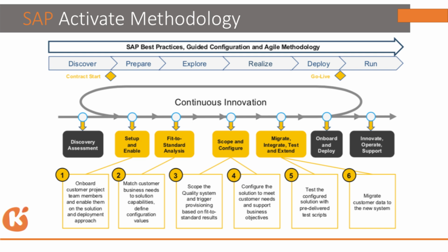Generally, when it comes to data migration, we can do it up to quality. In development you can import, and in quality also you can import. But when it comes to production, it is purely the client's responsibility, because it is production data. That would be SAP's better suggestion also: we should not import production data into a live system. Sometimes some customers may not accept and will give it to us. That is rare, but generally they have to do these data migration activities.